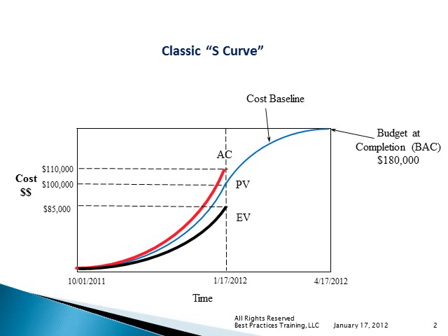Suppose we had spent $100,000 at this point in time, and we planned to spend $100,000. Does that really tell us that we're on budget? No. If we've only done 85% of the work, we're not on budget at all. So we need to bring in earned value to see the real world, to see where we are.